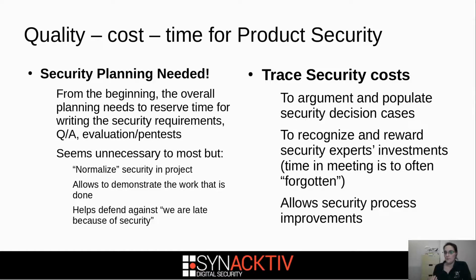You need to also trace the security costs. So that could be man days, most of the time it's man days, but it could be buying some stuff if you need to, equipment, subcontracting, I don't know. It's important to argue and to populate the security decision case, to say we don't cost that much or we did cost a lot.